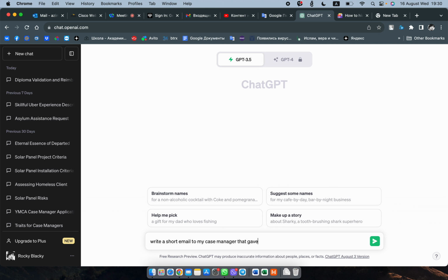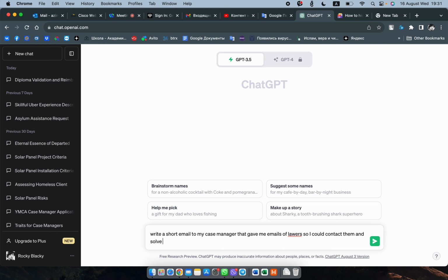Because they're going to start a sprint, they're going to take those from this product backlog, which may have 50 or 100 or we don't know how many. They could have a lot of them. They're just going to take the 5 out based on the priority, the customer's agreement, and the product owner's okay. They're going to start building these 5 user stories in the first sprint by taking one from the sprint backlog and working on that, then taking another one from the sprint backlog and working on that, and another one. So they'll have to pull from here as they're building and testing these user stories.